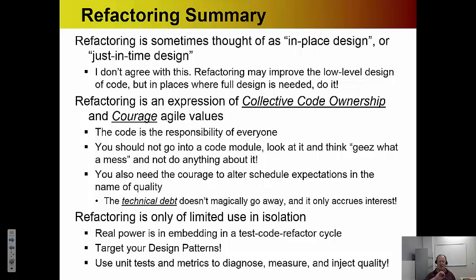And now we're saying there has to be something on the board at all times, some task on the board that says, I'm basically going to be refactoring and improving internal code quality without adding any story point values. We've just added a dampener on our user story burn down chart, at a time when we were trying to use Agile to get faster. All right, so there's a bit of a conundrum there.